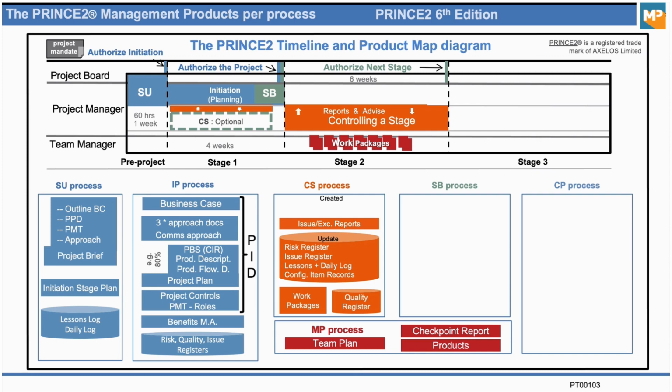Sometimes they will have to fill in issue reports, and some issues are big issues, so we call those exception reports, and they will be communicated to people above the project, which is the project board. Okay, that's why that's there.